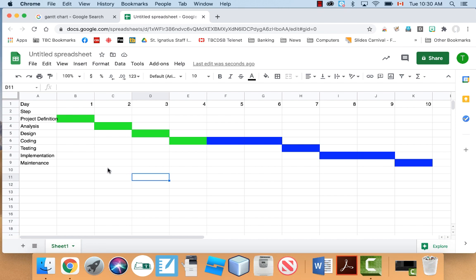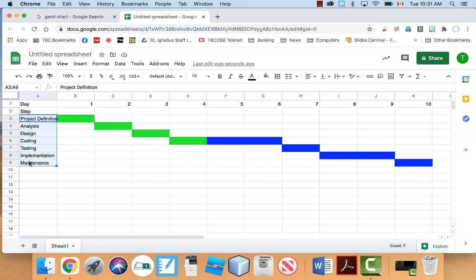But that's what it is. So, again, this is a quick video on how to make a quick and easy Gantt chart. And you can print this out if you want it. And what you do is you list all of your steps here. So all the steps for whatever your project is. Again, this is a computer science example, but it doesn't have to be that. It could be any kind of project. List all your steps here, and you list all the days on the top, and you just fill in, you just shade in your cells to make the bars, and you indicate when you're going to be working on those different steps.